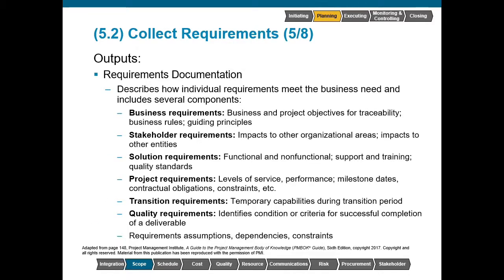The outputs from this process include requirements documentation. So anytime we capture a requirement, it is very important that we actually document how this requirement is meeting the business need. If it is not tied specifically to a business need, then why do we need to do this? And at that point, that requirement should not be within the scope of the project. Everything should be traceable to a specific need that this project is meant to satisfy.